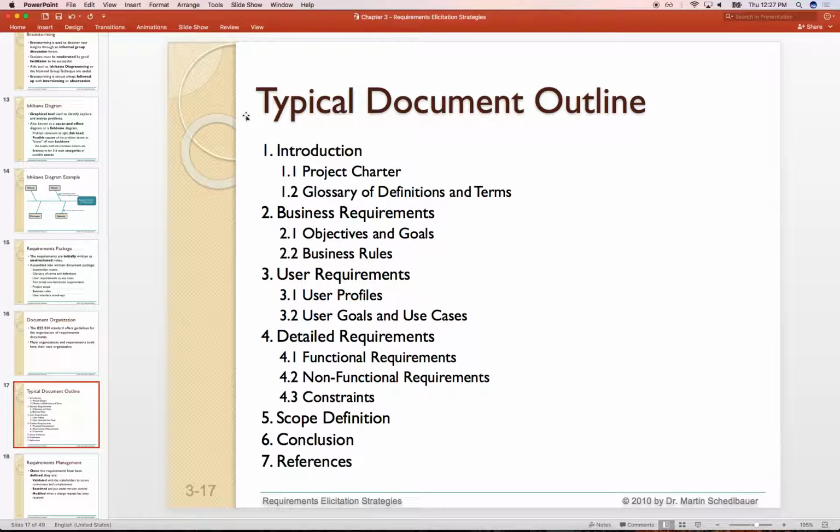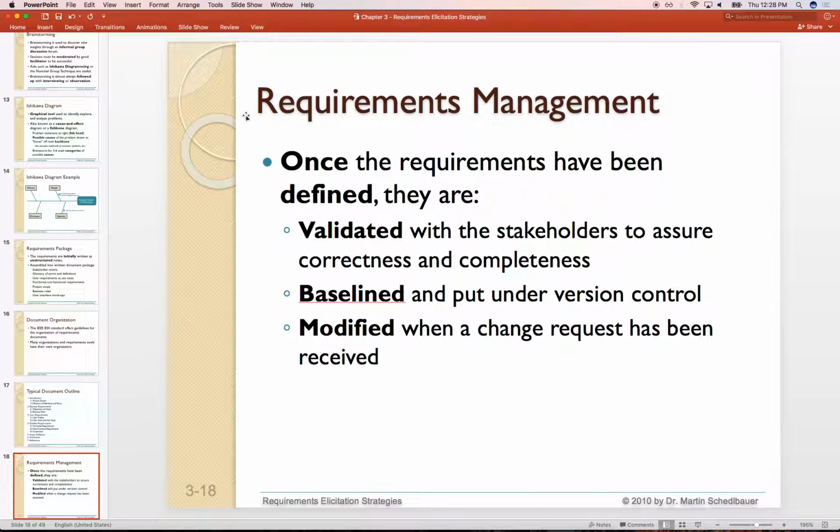We know enough that we can do it, but we don't know the details, and that will be tackled when we're going to start implementing it. As part of several sprints, we're going to select some of these requirements, and there we're going to specify some of the more specifics and fill in the blanks. We understand that not everything can be known a priori, and those kinds of risks would be assessed in the risk assessment matrix that we'll talk about a little later. So this should give us some confidence that we are going to be making progress as we go further.